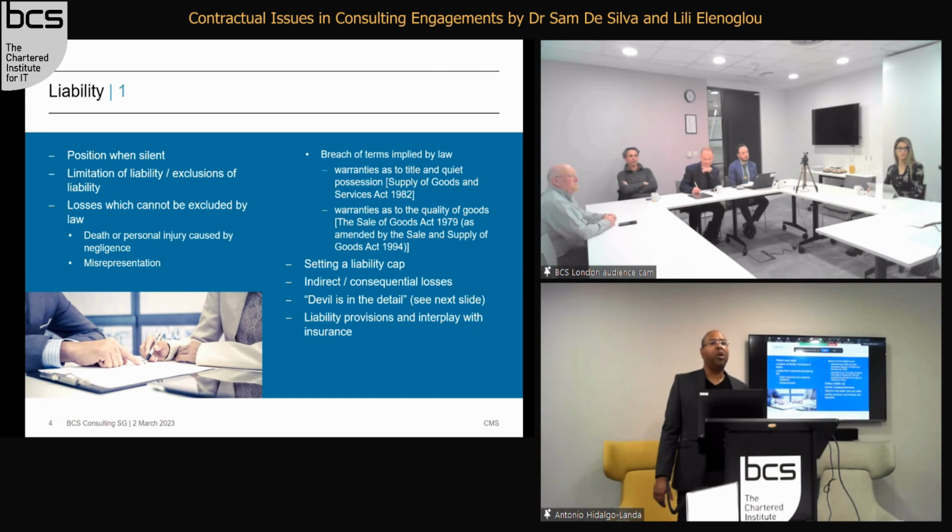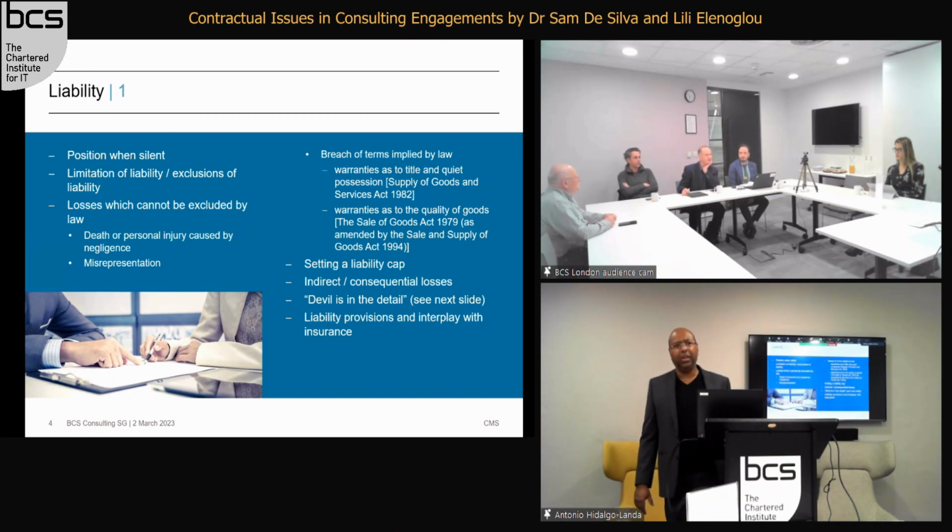But what you don't want is time is of the essence. But I think getting time is not of the essence is going to be very difficult for you to get in a contract. Really? Yeah. Unless you're dealing with someone who's not an astute customer. Most astute customers won't accept it. If the contract is silent on that, then it's just normal principles. Yeah. It just comes down to reasonableness, does it? Well, no, it comes back to the actual express obligations in the contract.